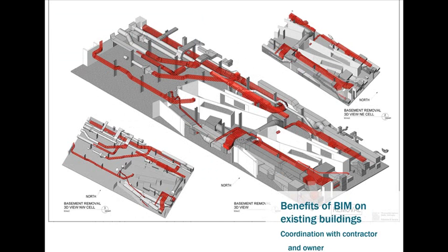You asked the question earlier about what kind of response we've gotten with the 3D views in our construction sheets, and we've got really good comments back from our contractors and owners. This was a huge project at Boeing, and we had owners or project managers and whatever just running around the building with just these sheets. We had one of these for the construction side and one for the demo side, and we found these printed off full size in color, hanging up all over the project. We found that the contractor was using this stuff on a daily basis to coordinate within their own guys what they're going to be doing that day and what was going to be next.